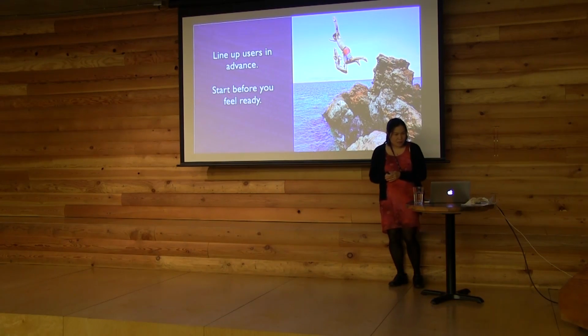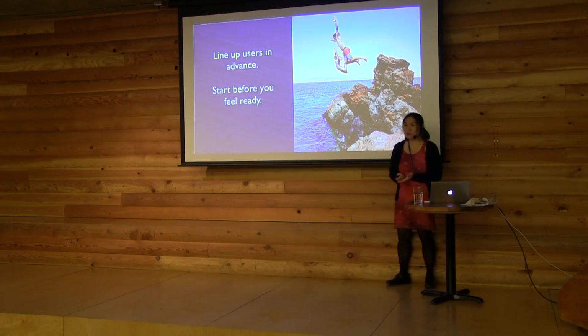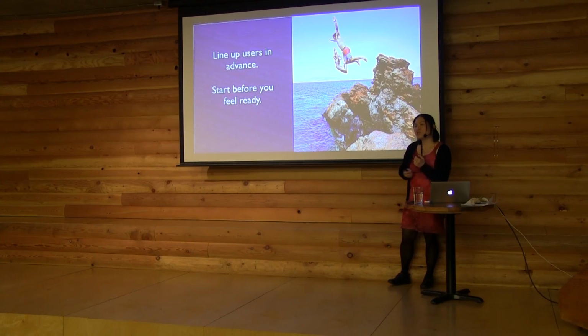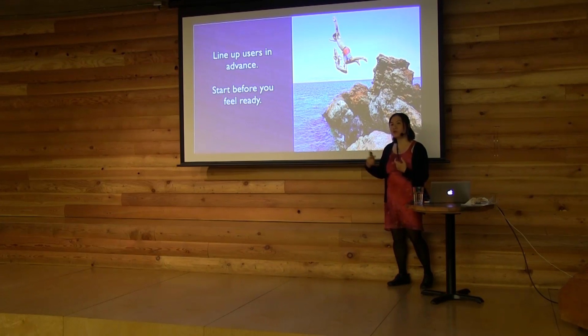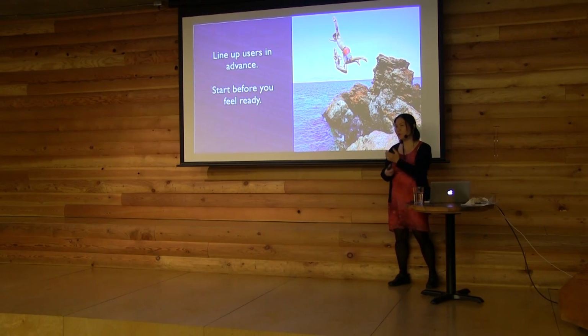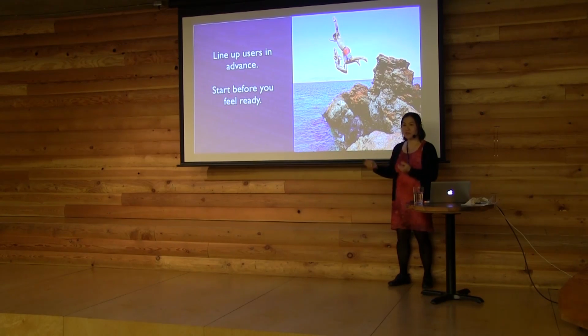So just a thought, one thing that I found works is, even at the beginning of your design process, well in advance of when you're ready, try to identify who those people are. Figure out who exactly you're going to be talking to, and message them, saying this is the kind of thing we want to show you, sometime in the next month or two. We don't know exactly when, but can we call you up on short notice? Then when you're ready to put something in front of them, you've got a phone number, you've got a person to call, they're ready to hear from you, and you can call them up.